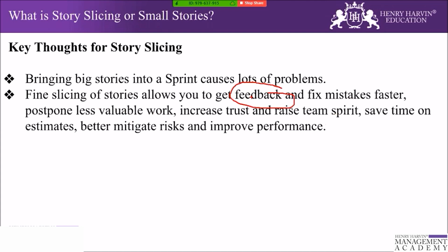And small stories provide more feedback opportunity at all levels of the system, and more opportunity for personal satisfaction. Think of a small dopamine rush that happens every time you complete something, right? If it is small, it will have more effect, and if it is large, it spans a long time. You will get multiple satisfactions at the end of each story. And a large story increases the risk that your team will deliver nothing at the end of the iteration.